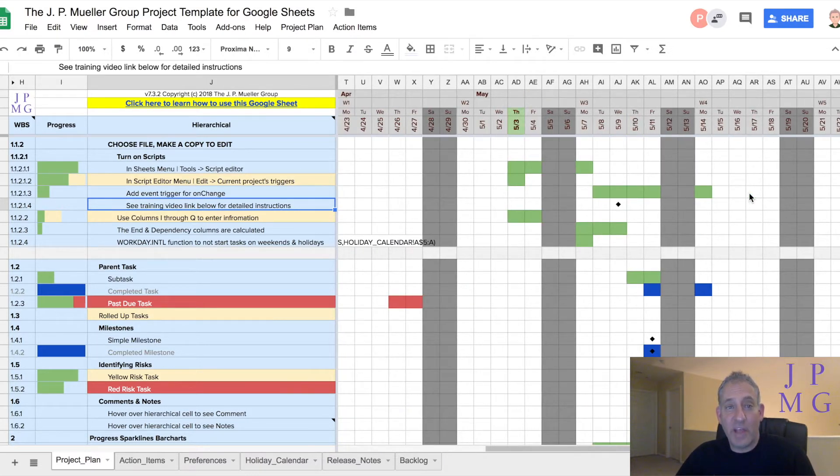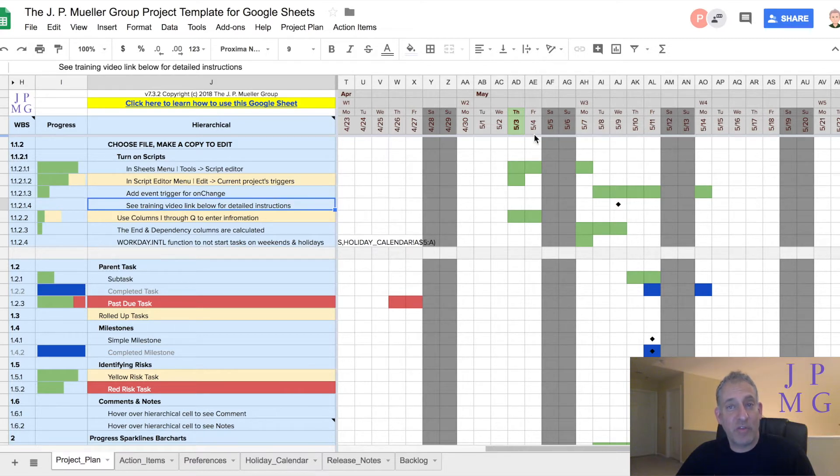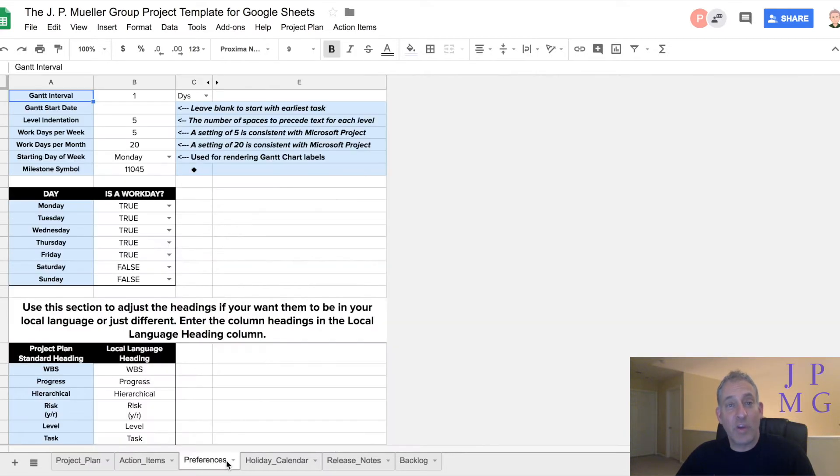My template offers Gantt charting with configurable time intervals and milestone indicators. You can configure what days of the week are working days and holidays.